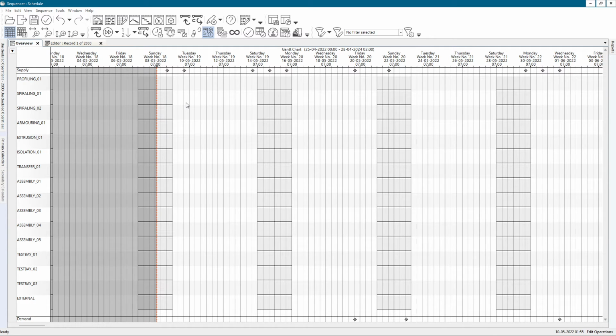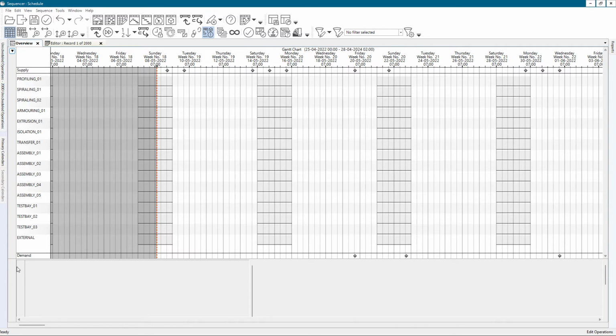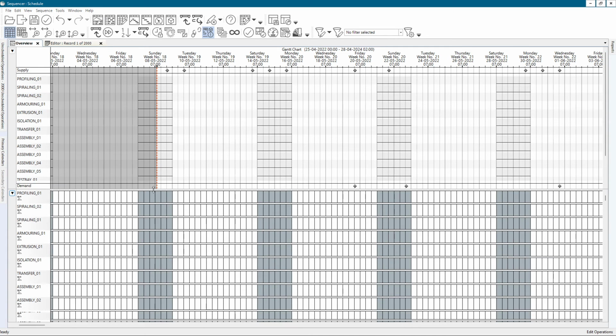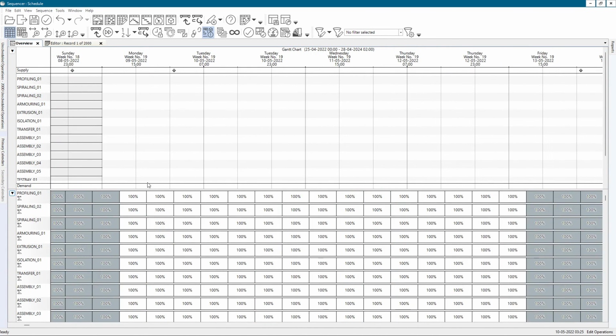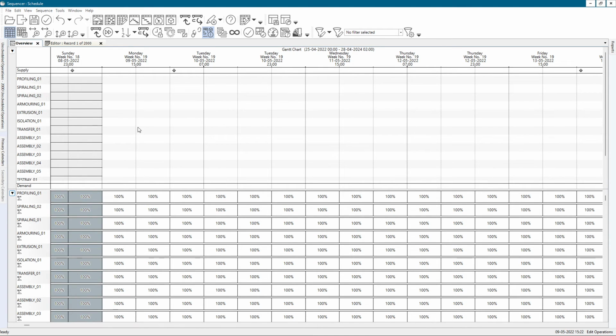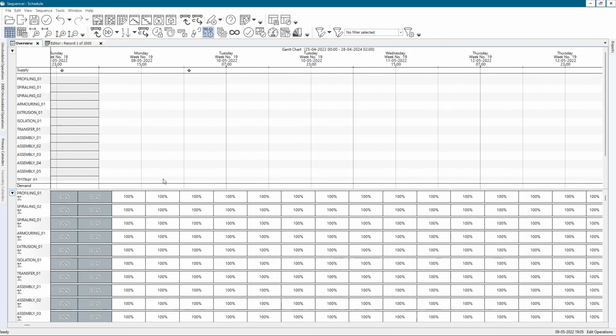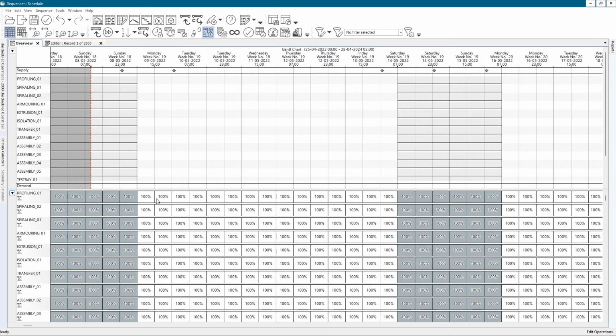Again, for the Gantt chart, gauge lines are more of a visual representation to help guide the planner. But for other Opcenter APS screens, such as the utilization screen, it can have a different functionality. So you see that for the utilization screen, the gauge lines are matching with the beginning and end of a time bucket. So if I zoom in or out, the utilization is redrawn to follow that pattern.